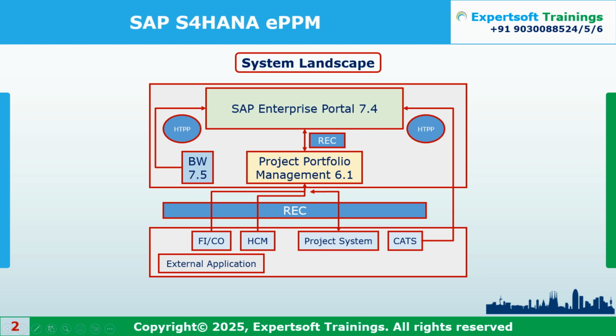Gate is nothing but every stakeholder will take some sort of approval for that particular phase, say like the kickoff phase. So under the kickoff phase, maybe you have submitted some documents to your stakeholders. Then they will approve. So the first gate has been approved.